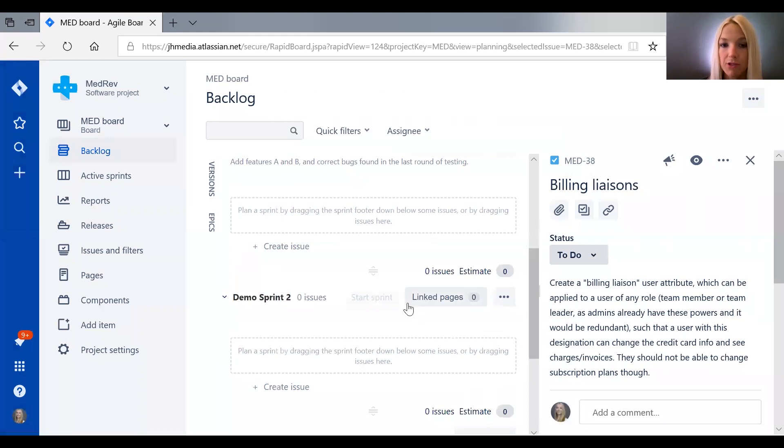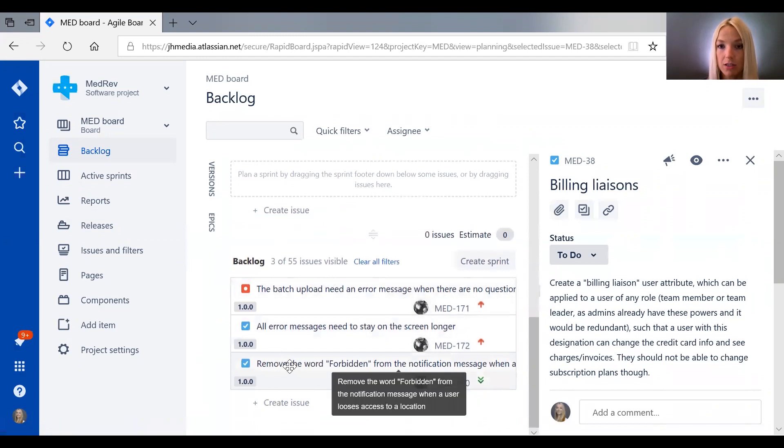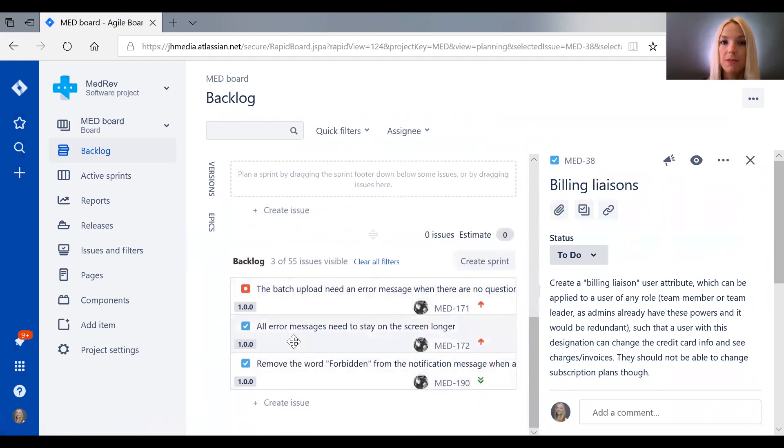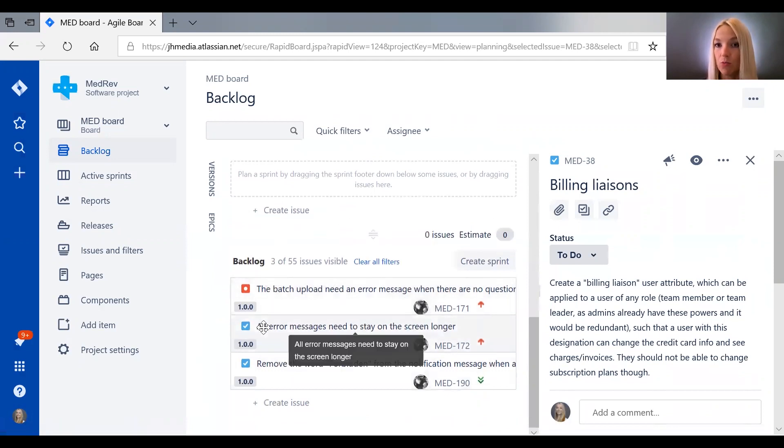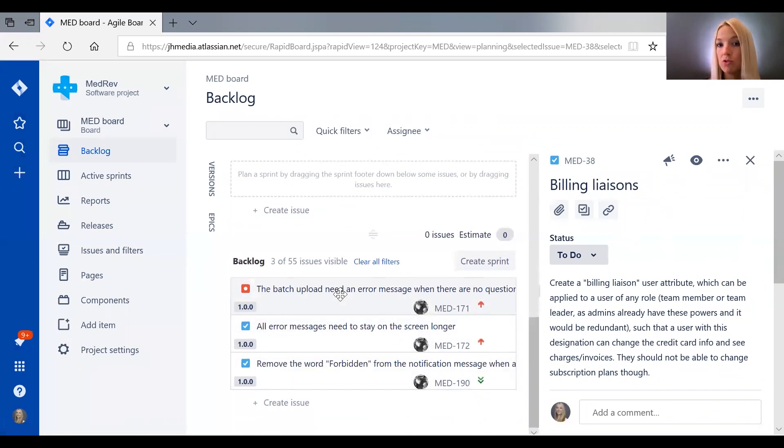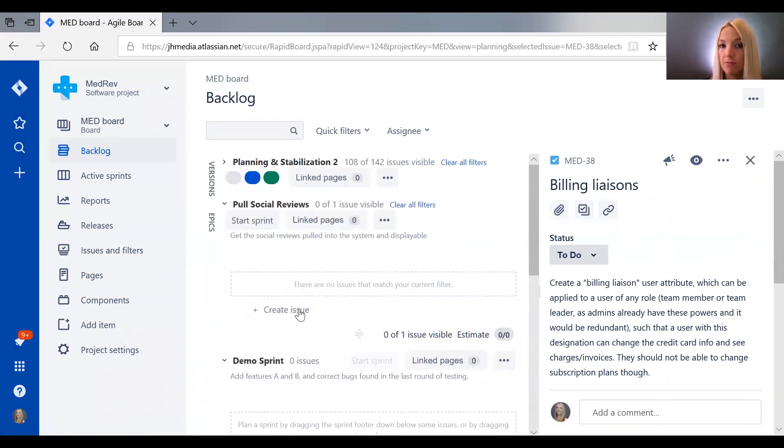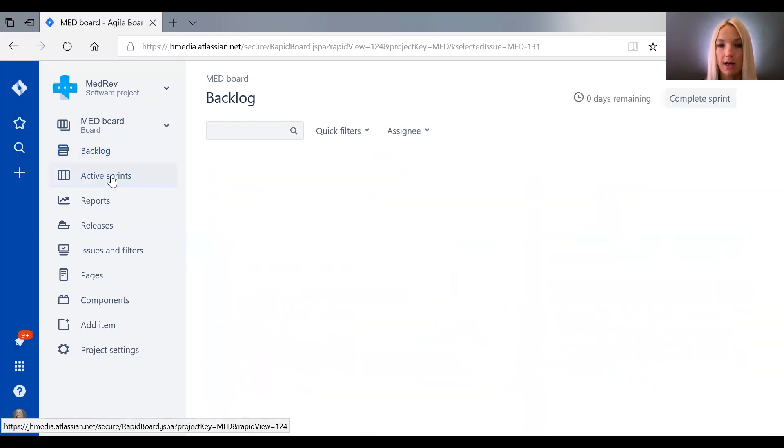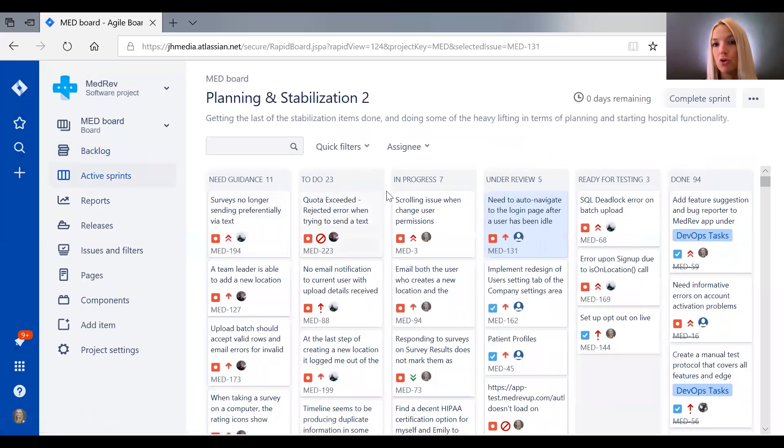So that's how we create new sprints. And then you can take issues that are in your backlog. And so your backlog are issues that have not yet been assigned to a specific point in time. So these are things that we want to do, but we haven't planned out exactly when we're going to do them. You can simply drag these into the sprint that you want them to go into. And so that is how you can quickly, for the active sprint, show all the tickets that you've dragged into a sprint.